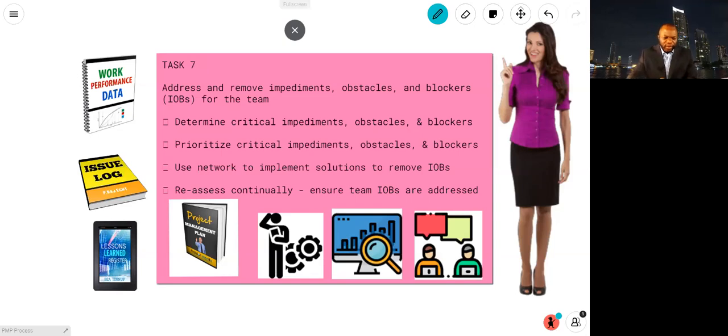Now, the person that we go to escalate issues to is not management. If you are in the development team, you go to your Scrum Master for escalation. They're the primary escalation point, right? And the reason for that is if we go to management, we might have to go to 3 different managers, 4 different managers, paper trails and all that jazz. But if the Scrum Master is helping you to do that, it takes the weight off the team so the team can focus on the more important things. So the primary job of the Scrum Master is to help the team have a great day. Buy them coffee, I don't know, buy them ice cream, make them happy. That's the job of the Scrum Master.